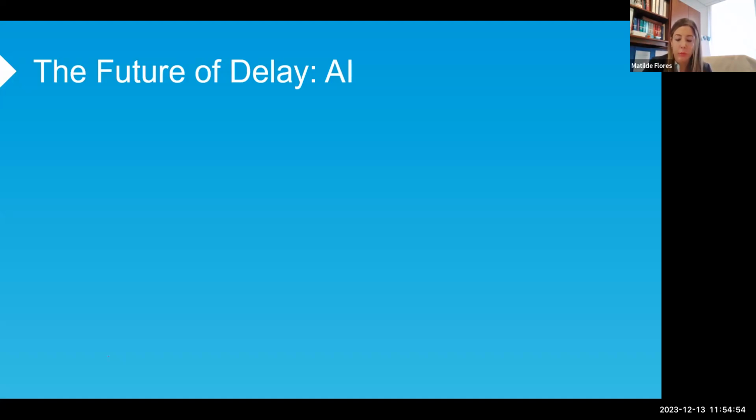The AI tool will be as good as the input data that you feed to it. So the quality of the contemporaneous record, and in general, the quality of the good record keeping practices, are equally important, even if you have a very sophisticated AI tool, I think. I mean, that goes the same with giving the information to the delay expert. If they're not given good information, then they can't do their work properly.